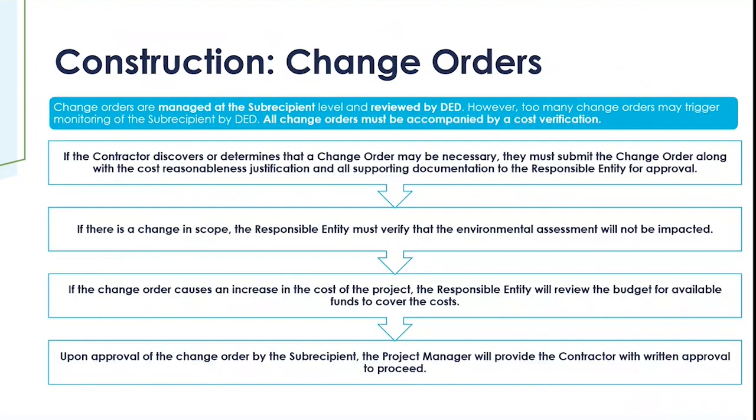So we talked about change orders a little bit in the context of budget amendments. We'll walk through the process for submitting a change order if one is required. Change orders are managed at the subrecipient level, but they must also be reviewed by DED. Change orders are permissible, as we mentioned, because things happen. Sometimes we have unexpected activities that occur on the job site, but it is important to keep in mind that too many change orders may trigger additional monitoring of the subrecipient by DED.